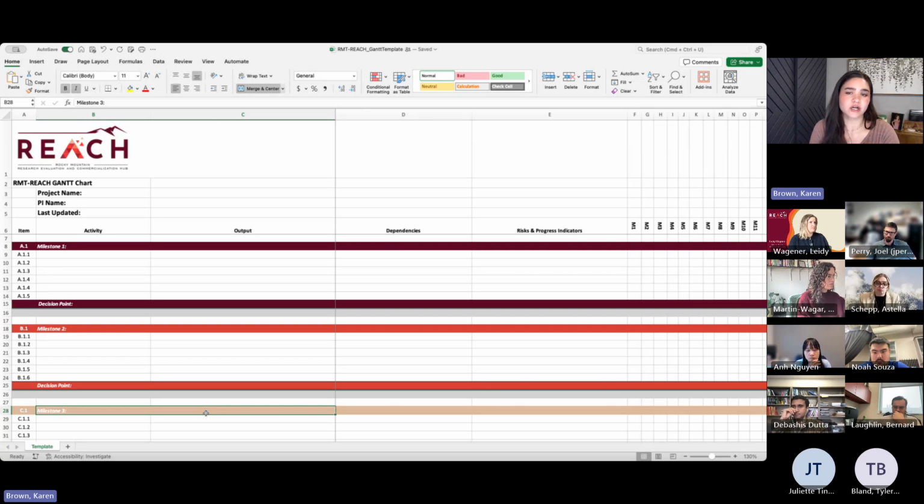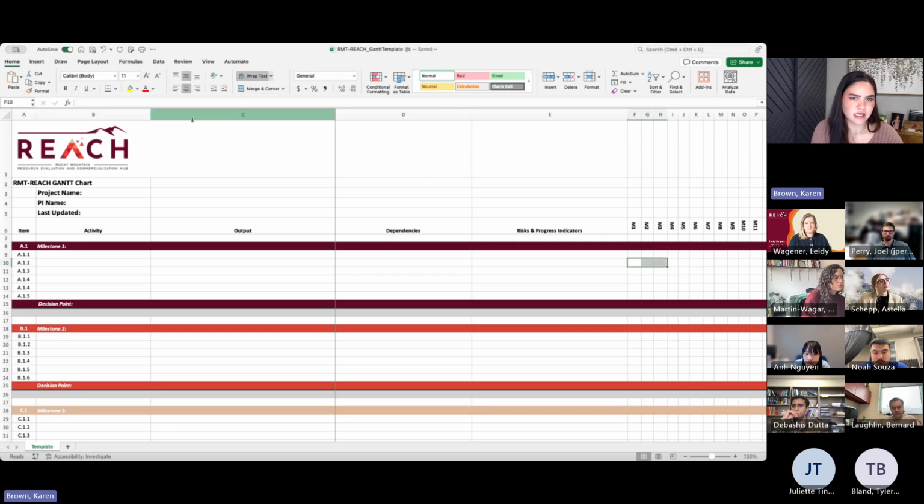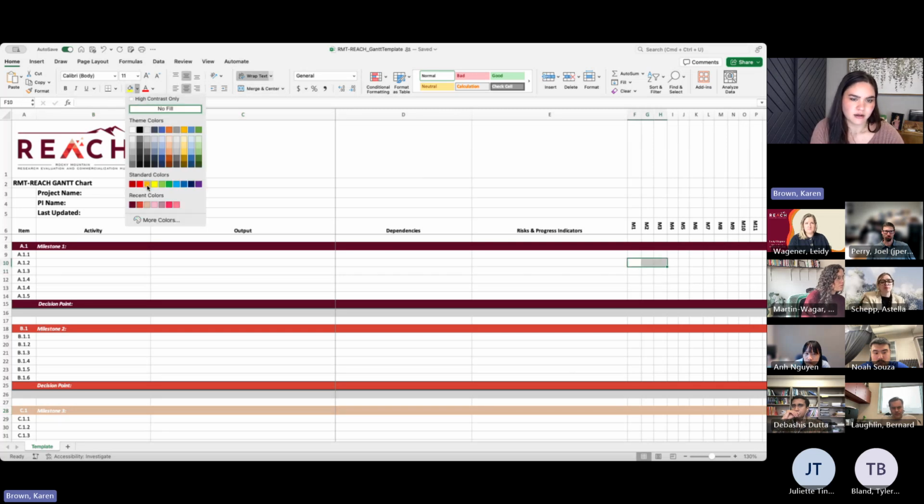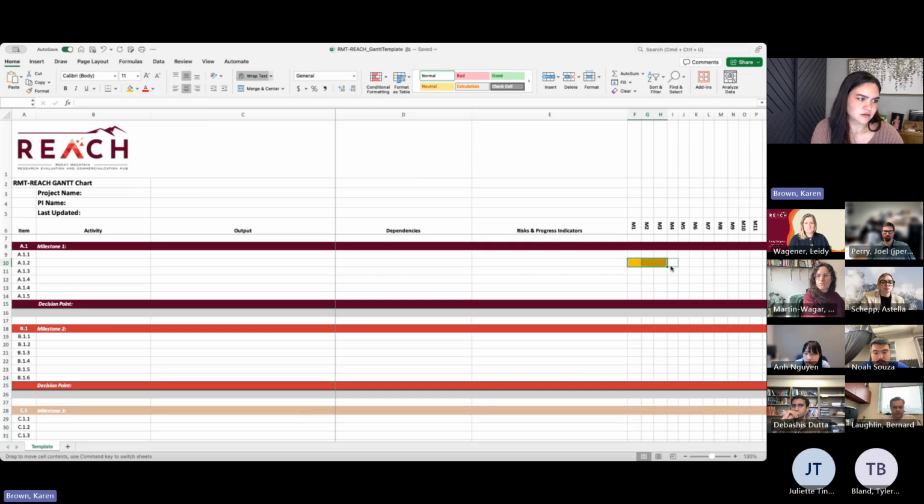So that's an orientation to the purpose of this from the review standpoint, and then thinking about it from the standpoint of we're going to be working really closely with you over the next year. Right now I'm doing the project management for our 5 funded projects from our first cohort, and monthly we're pulling this up, we're looking at it, we're adjusting our milestones. If milestone 1 and 2 is supposed to be done in 3 months, and then we have to shift it over because something happened, some feedback, some tool didn't come in, then we do that and we adjust.